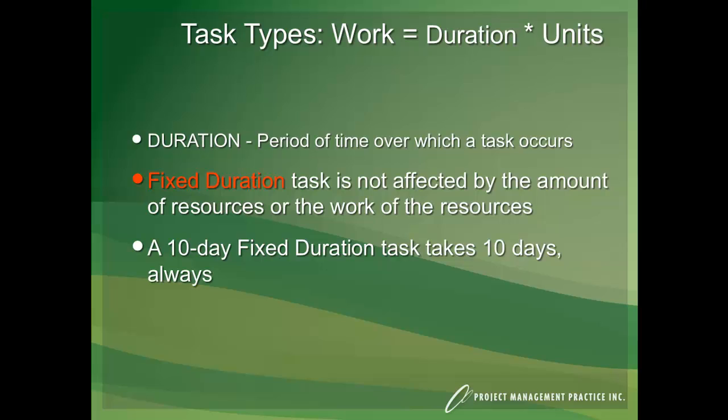So the default assignment in Microsoft Project when you assign a person to a task is 100% or whatever is in your max units field. So if it's 80%, it'll default to 80%. So if we have a 10-day task and it's fixed duration, what that really means is that regardless of how many people and how many percent allocation of a person I throw at that task, the duration is going to remain fixed. So let's just take, for example, going to a trade show.